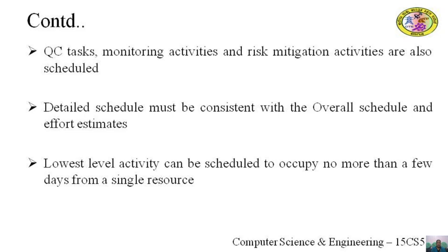In addition to the engineering tasks, QC tasks of the quality plan, the monitoring activities of the monitoring plan, and the risk mitigation activities should also be scheduled. The project manager determines the effort for the overall task from the detailed schedule and checks it against the effort estimates at each level of refinement.